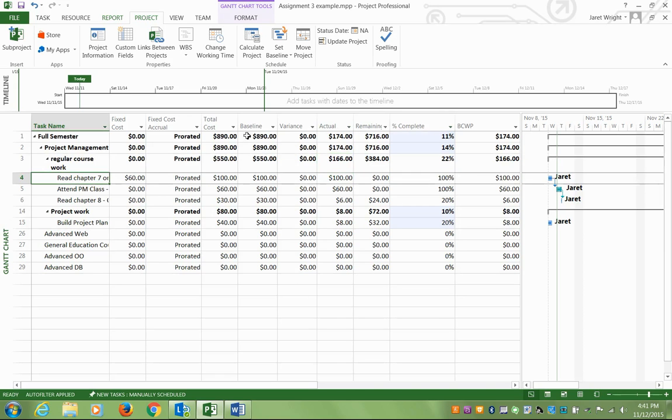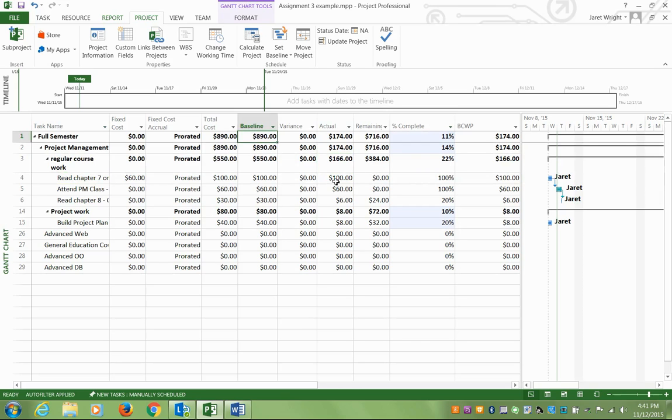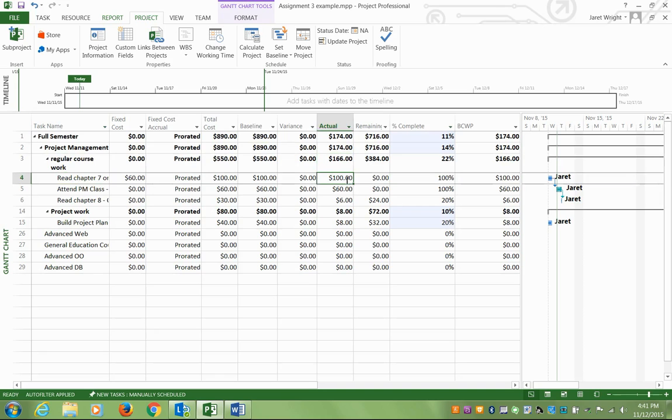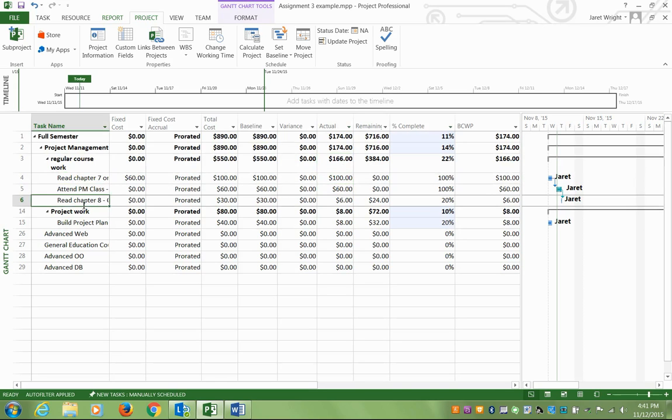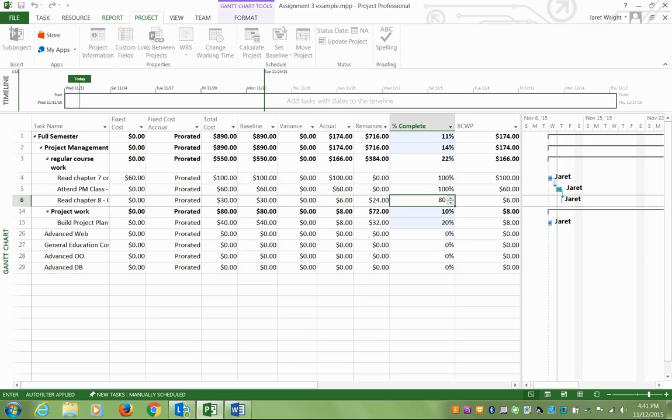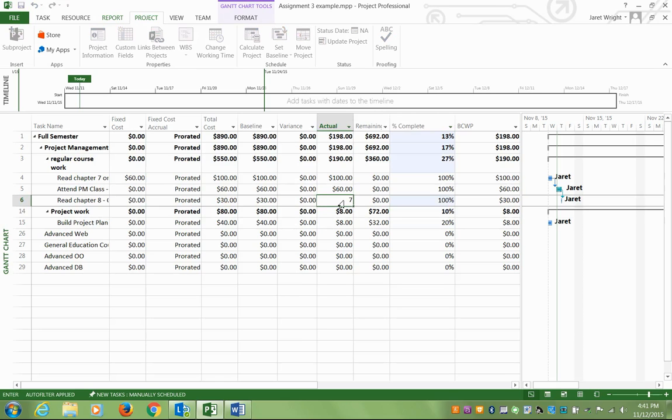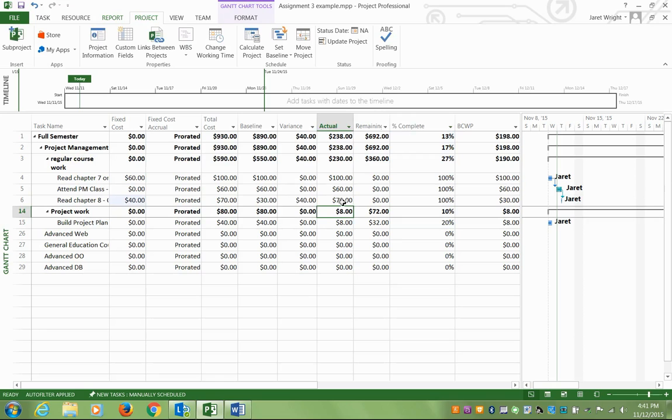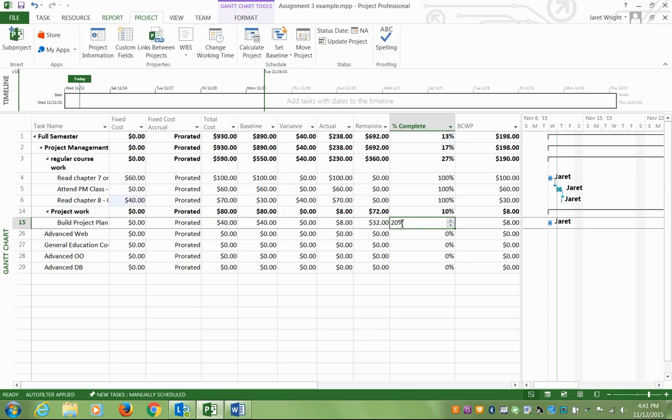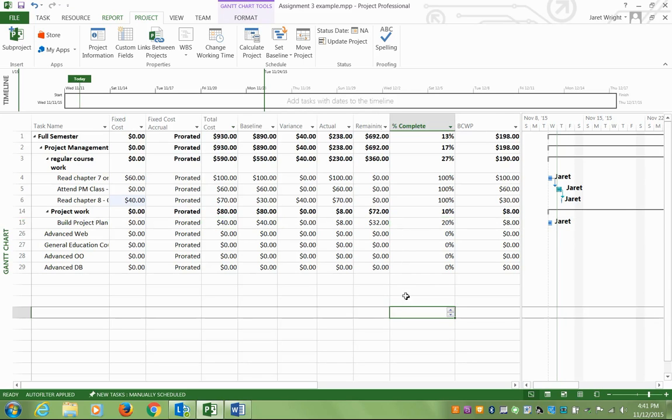Now, I have my baseline cost, and I can actually put in, what were my actual numbers? What did I really plan to spend, or what did I actually spend? So, maybe this chapter 8 is really complicated. Instead of it being, maybe I've invested $70 so far. When they're percent complete is only 20, it's assuming that my cost shouldn't be more than 20% of this number. But once you have something done, you can put in whatever your actual was.